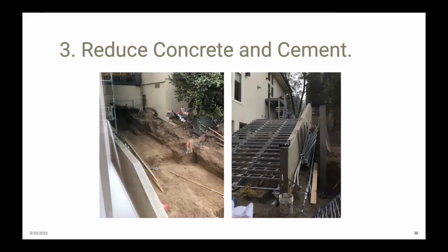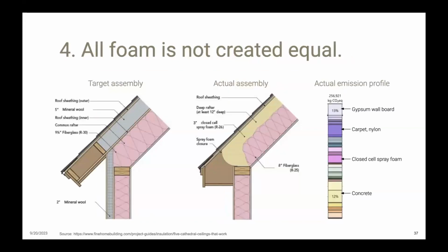However, the change added about 20% more concrete to the original proposed deck design, and it led to a 15% increase in carbon expenditure above our original proposal. I think if we had understood the magnitude of this change and had the numbers to back us up, we could have made a stronger case for either sticking with the original design or reducing the carbon intensity of our concrete mix. Next. Okay, and then lastly, all foam is not created equal, so it's important to be thoughtful when